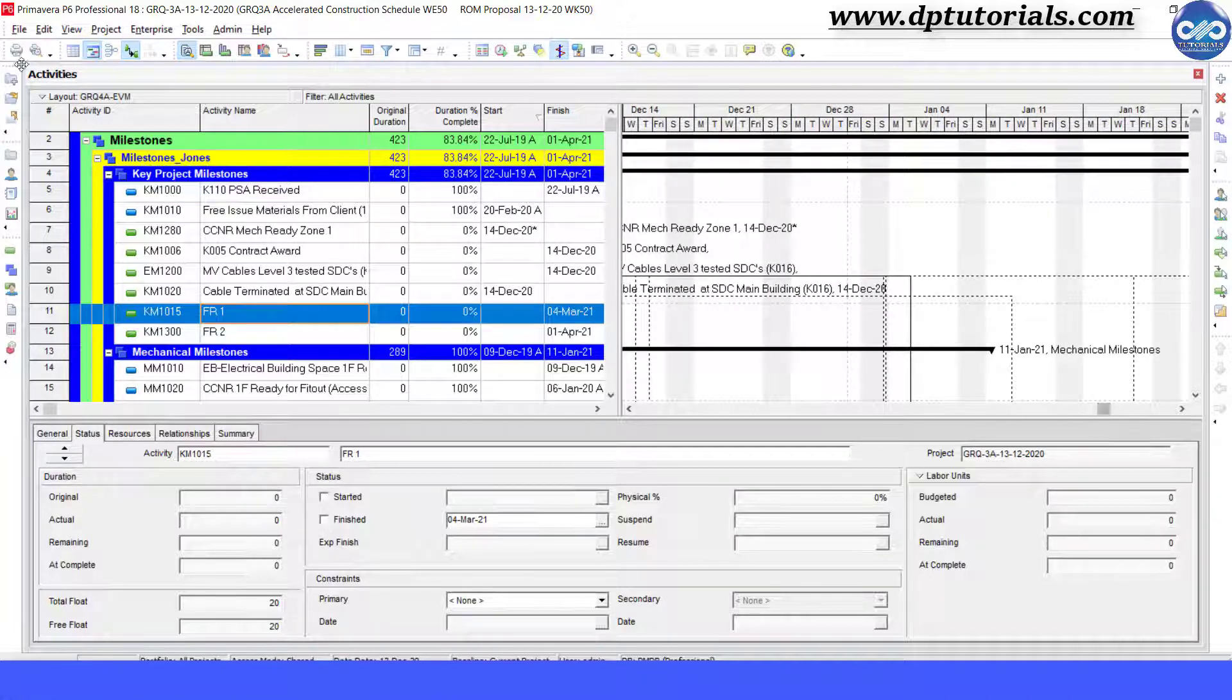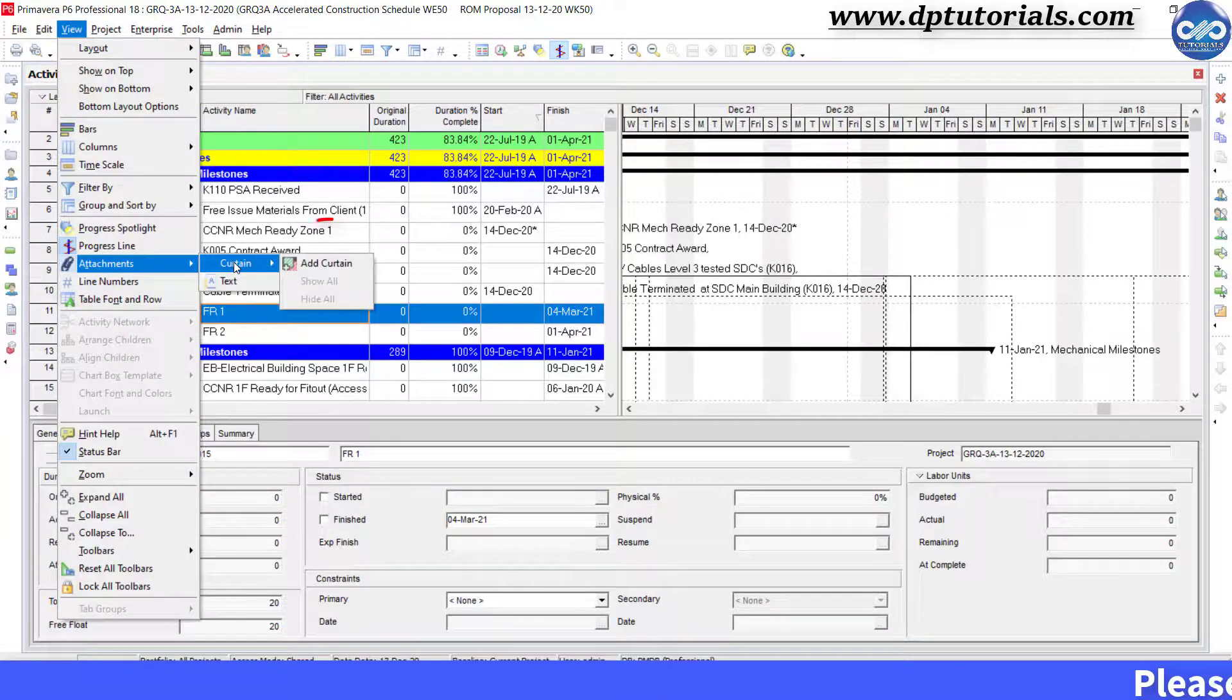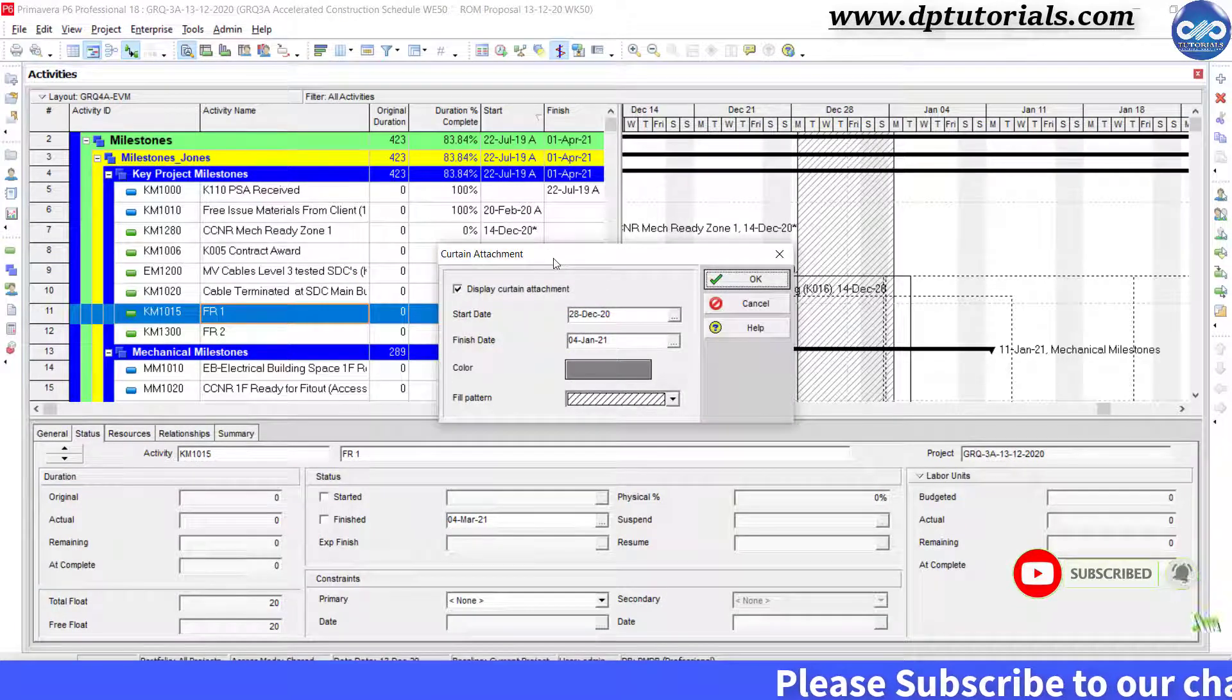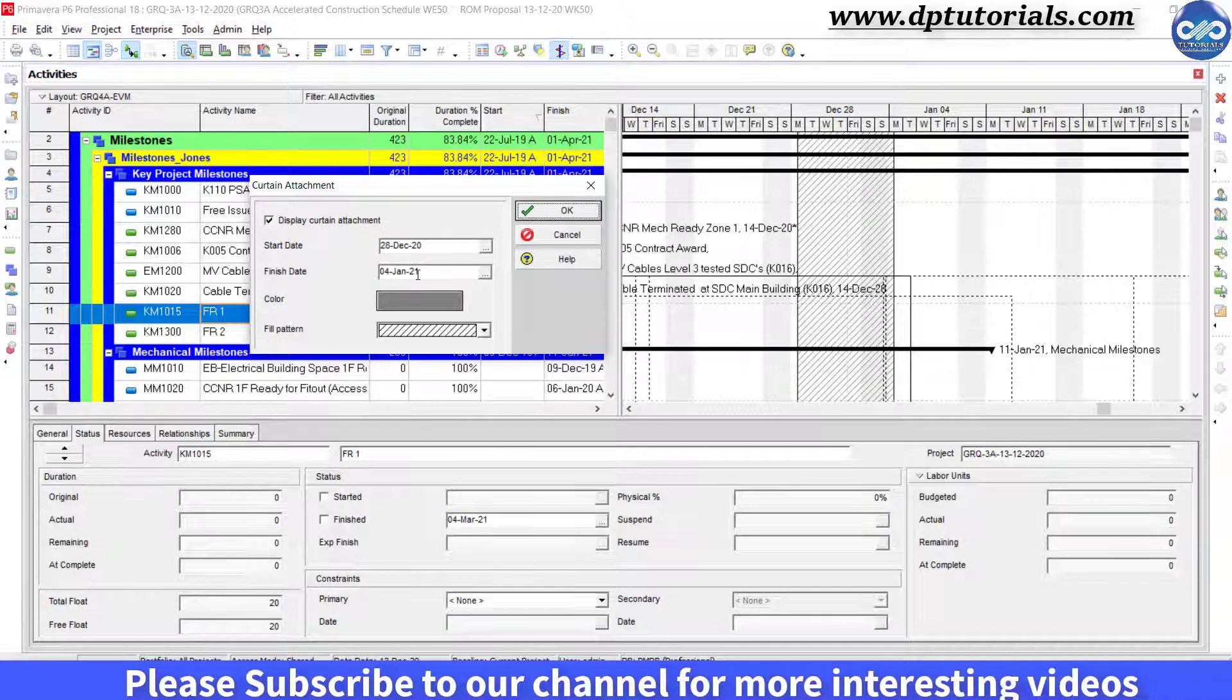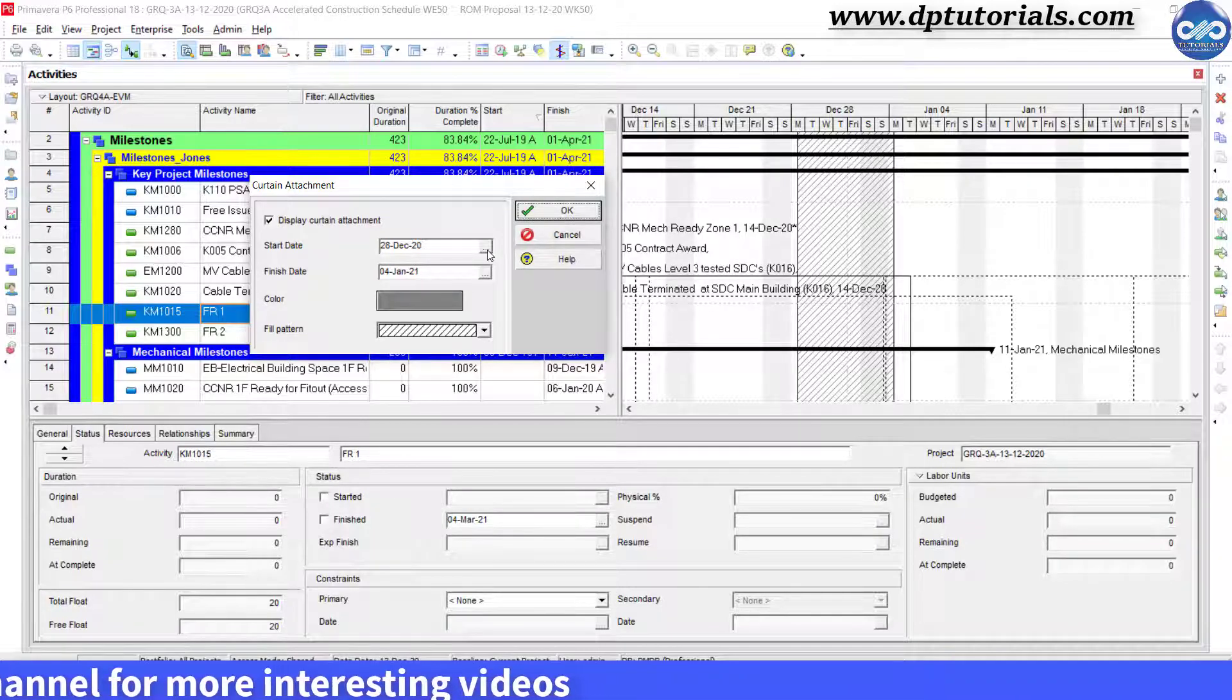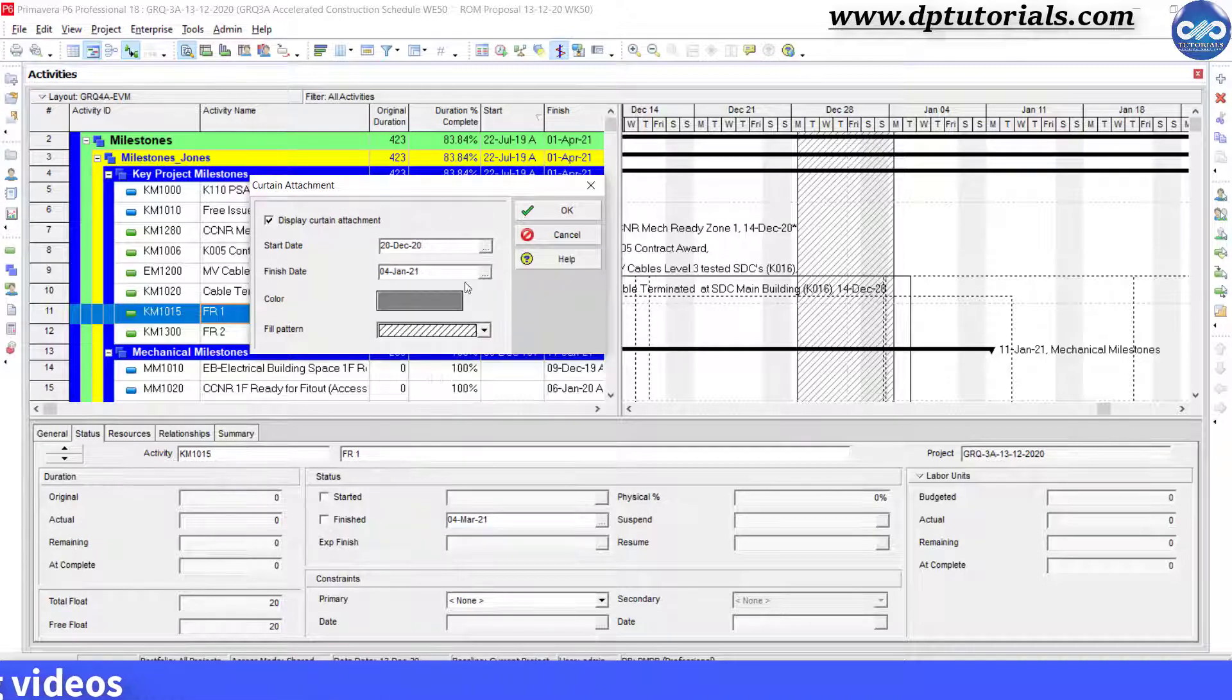Go to View, click on Attachments, select Curtain and then click on Add Curtain button. Now in this curtain dialog box, you need to mention the start and end date of the non-working period. Say last year's Christmas season from 20th December to 4th January 2021.